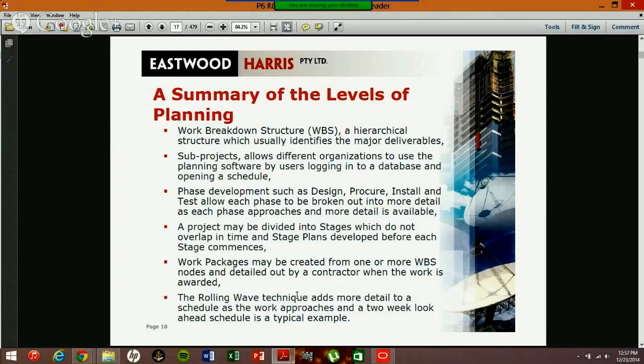And that's how they'll track it at first. But as 2 weeks approaches prior, let's say a 2-week look ahead, you'll start to break it down and say, okay, we need to do a review. We need to create the design, do review 1, and then you start to break it down as time goes on. So it's called a rolling wave because it's a big entire thing at first, and then as time goes on, they start to break it into different phases of how we should go through.